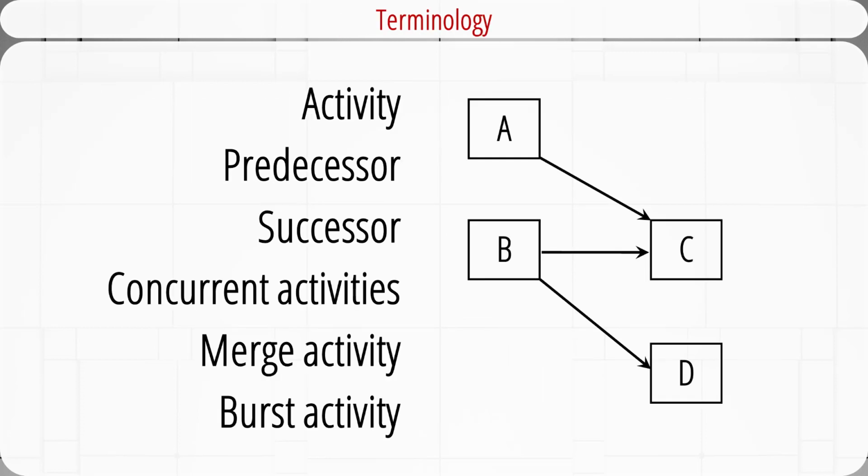Let's see some terms used in developing project networks. An activity is an element of the project that requires time, either work or wait, but may or may not require resources. Activities that consume resources are easy to understand. Examples of activities that do not require resources include waiting for contracts to be signed, materials to arrive, drug approval by the government, budget clearance, etc. The diagram on the right is a part of a project network. It has 4 activities: A, B, C, and D.